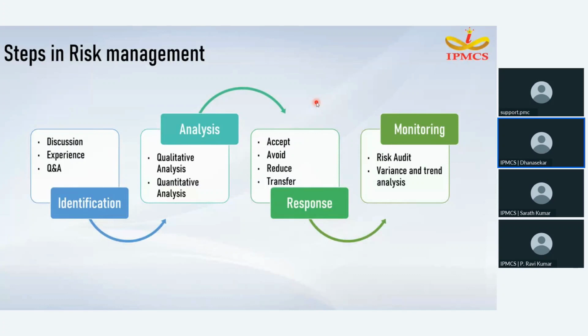Next, using an application, we need to feed the risk items into it, and we need to set the response matrix. The next step is doing the analysis. We have two methodologies: qualitative analysis and quantitative analysis. Among these, we need to choose the right method that suits our project. Then we can find the analysis reports.